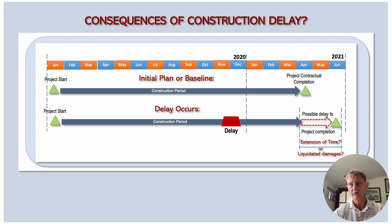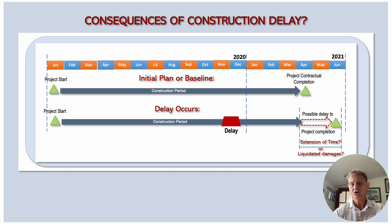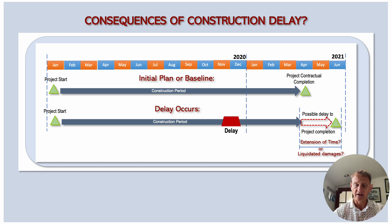But what happens if there is a legitimate delay that the contractor suffers? Surely it's not fair for the contractor to be liable for damages, and construction contracts would then include a provision for extension of time — that allows the contractor to apply for the contract completion date to be extended to a later date as a result of the delay.